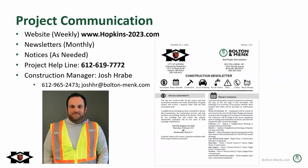So the project communication that we'll have again on that website, we'll be updating it weekly and sending out email and text blasts on at least a weekly basis. If there's something bigger happening during the week, we'll send that out as well. Newsletters we'll send out on a monthly basis. Notices will be delivered door to door as needed, especially for those water shutdowns and access restrictions that really only affect specific properties, not the whole project.